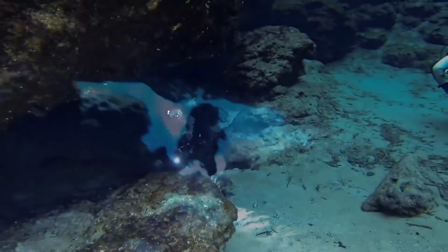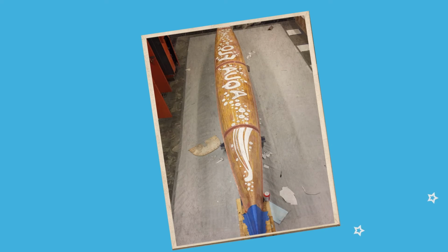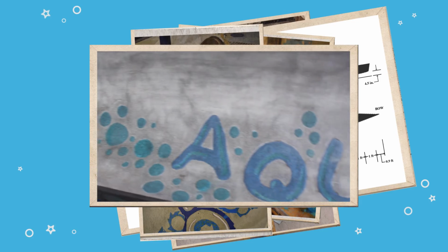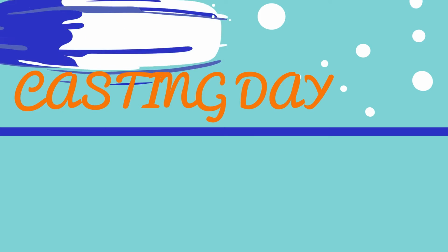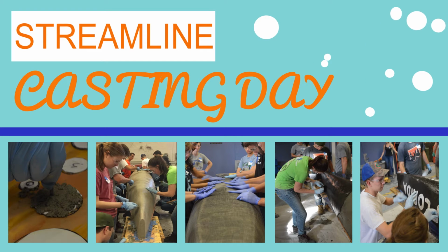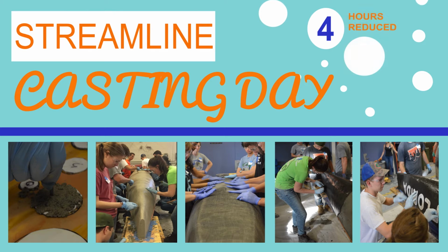At this point, all of our ideas and efforts came together and we were ready for casting day. But just before the creation of our canoe, over 100 hand-cut aesthetic inlays were placed along the wooden form, boldly encapsulating the springs theme all around our canoe. Bubbling with excitement to build the canoe, the team asked, "What if we could streamline the casting day process?" We switched our method of concrete placement from using a pneumatic gun to hand placing the three layers. This new system cut out 4 hours of casting labor and reduced the usual 15 batches of concrete down to only 9 batches per layer.